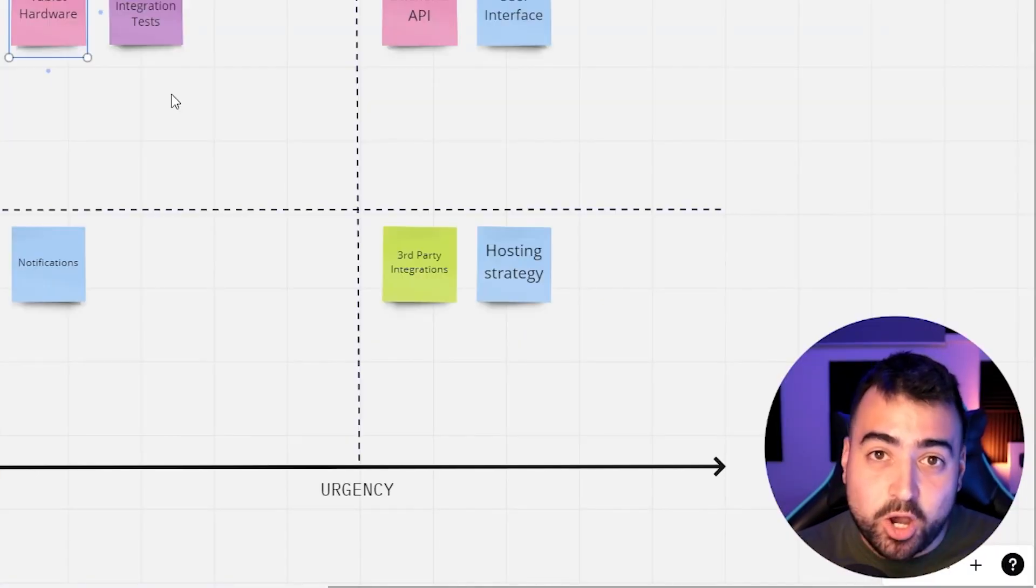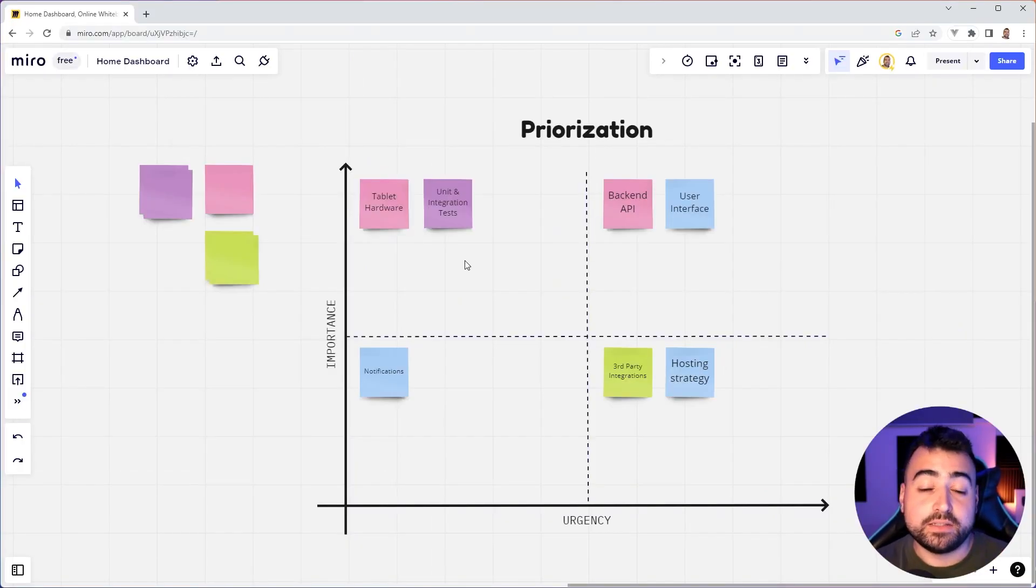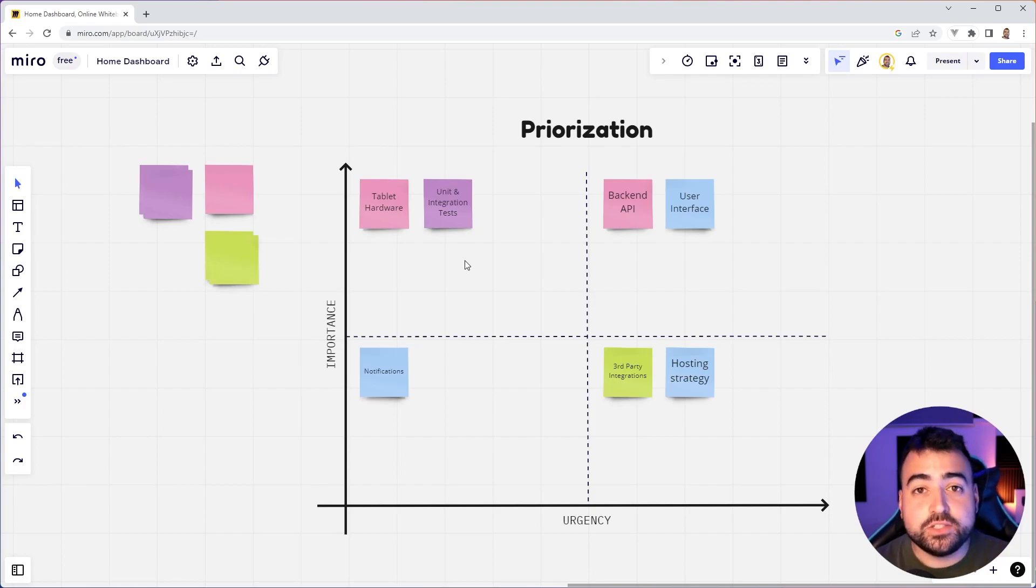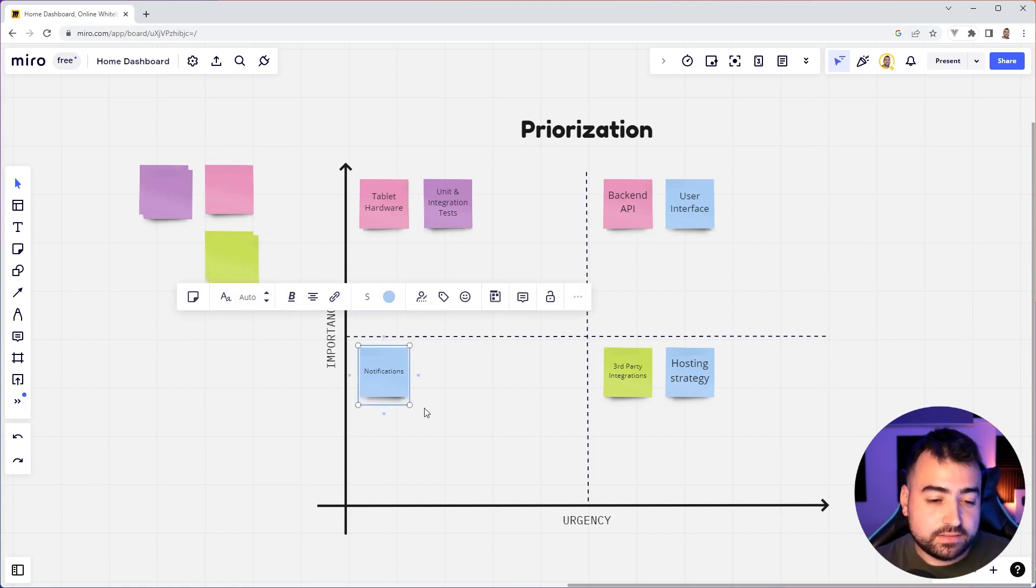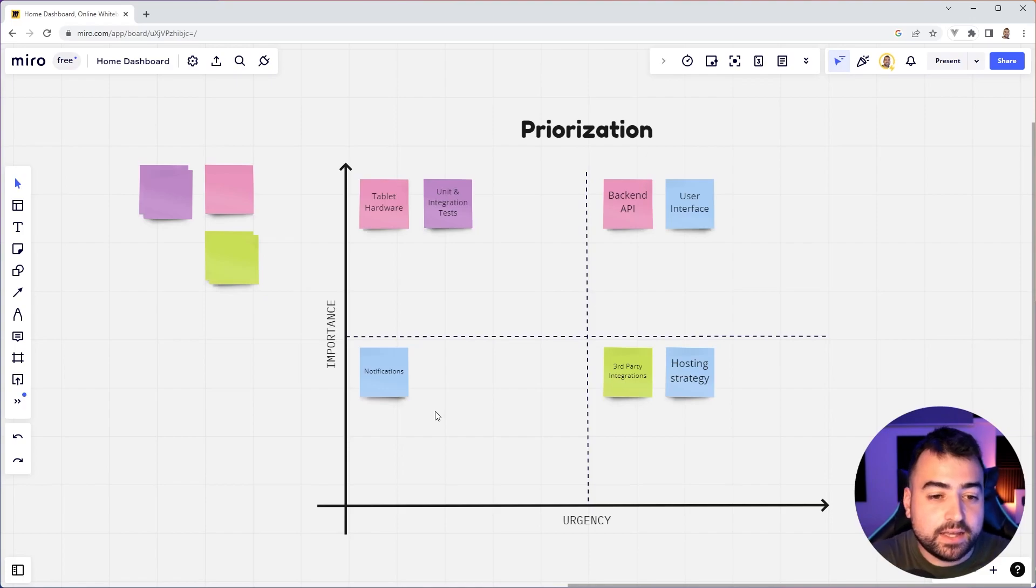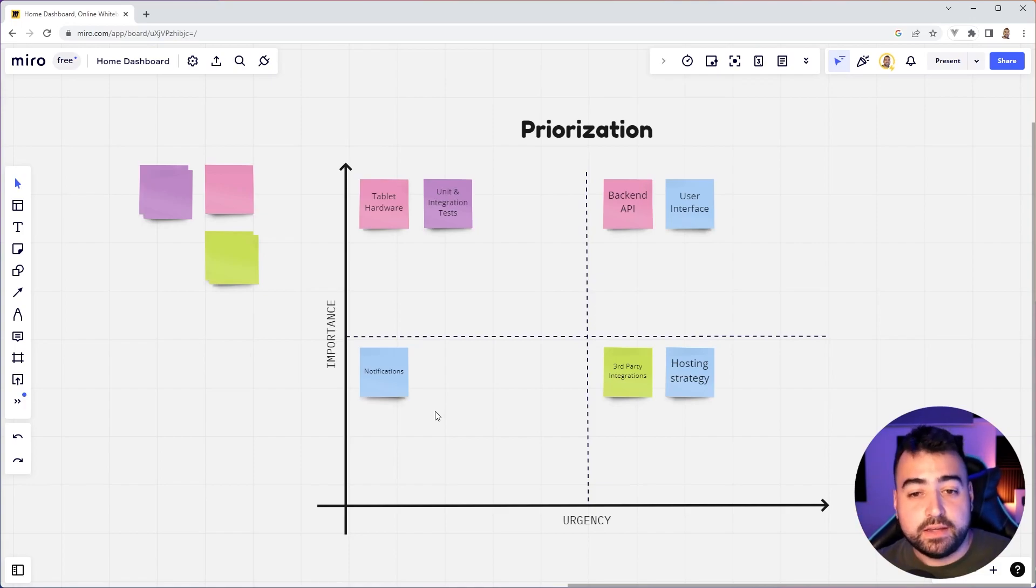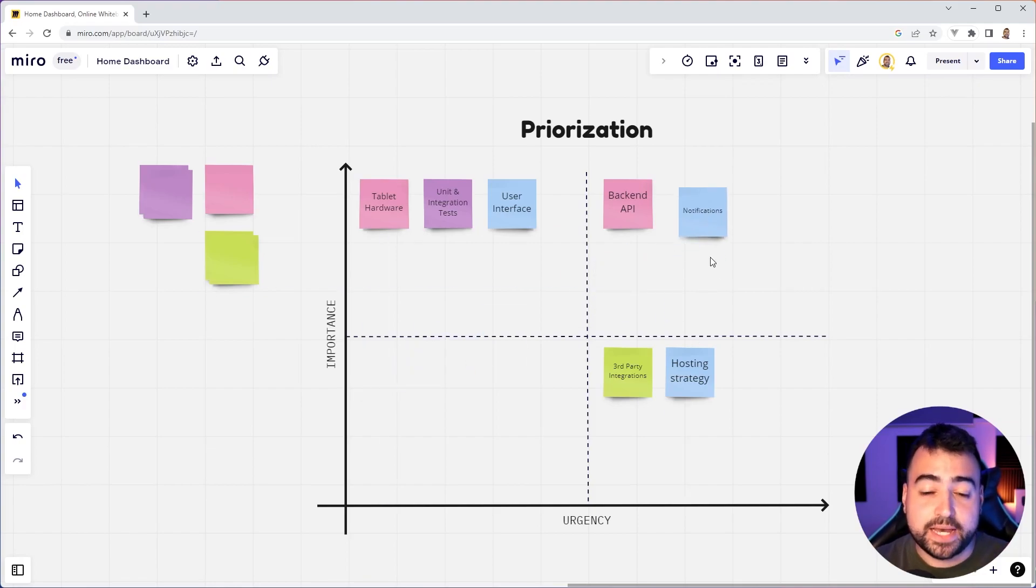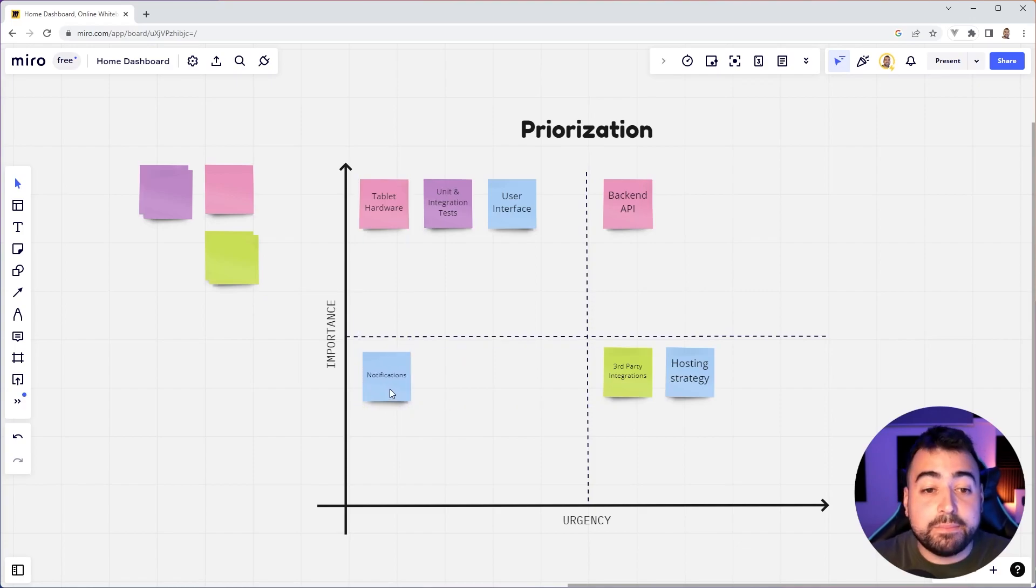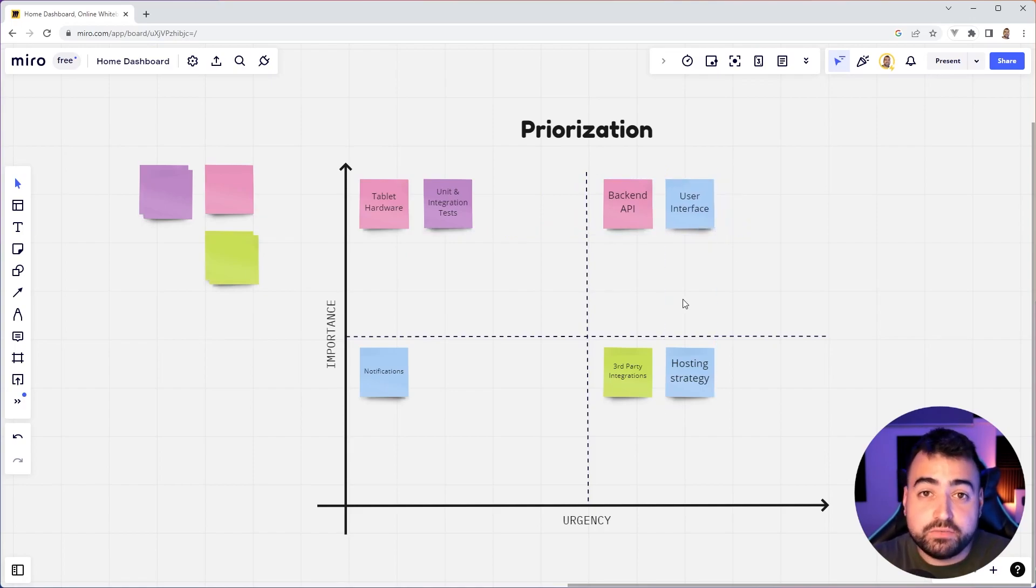And that right there, that at the moment is actually crucial to the power behind this matrix, because something like this is much more powerful when you come back to it frequently. If this is checked every day, things might change around. Let's have a look at the notifications sticky note right here. Currently, it's low importance and low urgency. I probably will never get around to having notifications appear out of this home dashboard app. But as I head towards the end of the project, maybe the user interface drops down to low urgency. It's almost done. I don't care about that anymore. Then notifications bang appears in the high importance, high urgency. So if you're constantly updating this matrix, which of course, I am going to do as I move forward with this project. But if this is constantly updated, I think that is where the true power of this prioritization matrix is found.